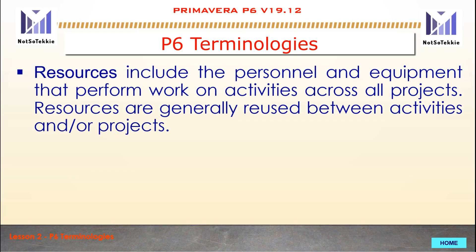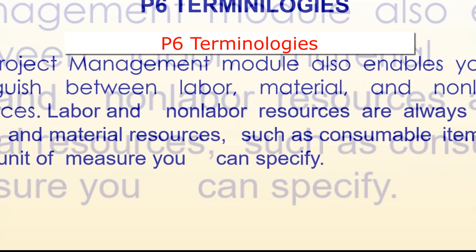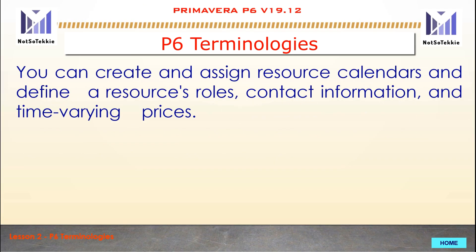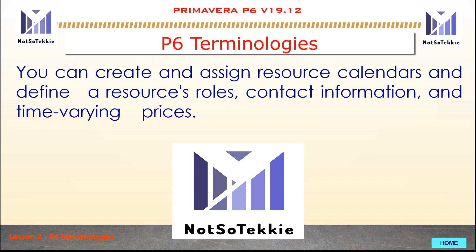Resources include the personnel and equipment that perform work on activities across all projects. Resources are generally reused between activities and projects. The project management module also enables you to distinguish between labor, material, and non-labor resources. Labor and non-labor resources are always time-based, while material resources, such as consumable items, use a unit of measure that you can specify. You can create and assign resources, resource calendars, and define resource roles, contact information, and time-varying prices.